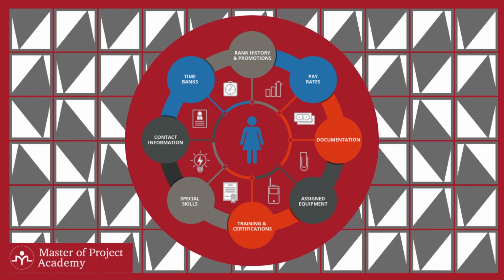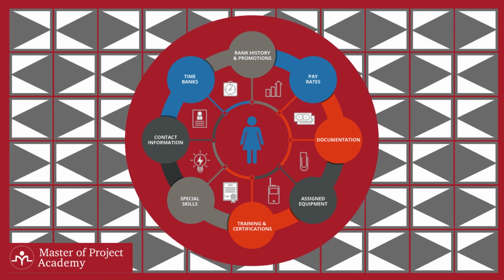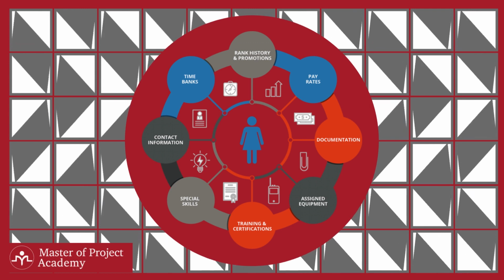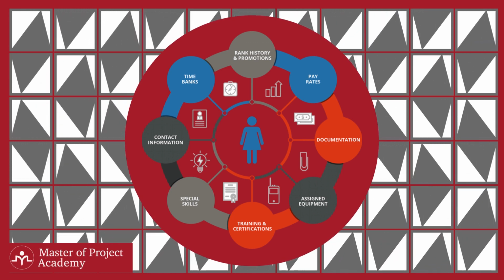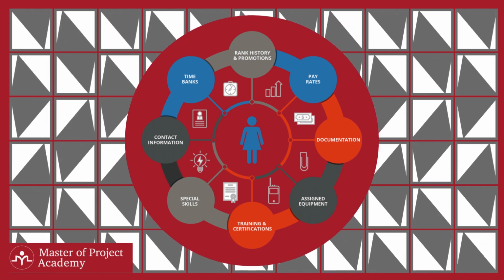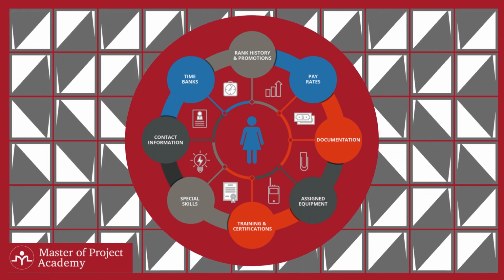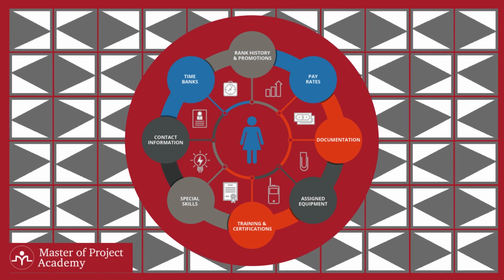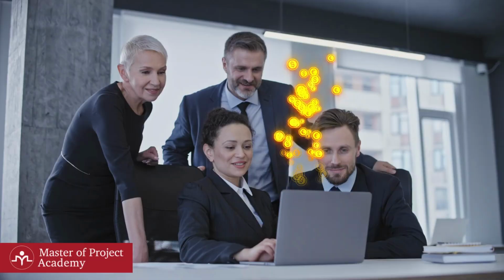3. Assign resources to tasks. After completing Step 1 and Step 2, you can now decide what resources are needed to fulfill the work with the right quality standards. This step involves calculating the needed tools and machinery, the material needed, and the human talents needed to complete the tasks.